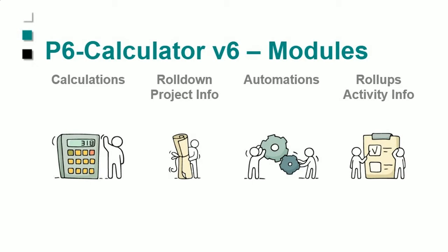So that's one example. Another example that we use for our contracting clients very, very often would be to take the cost price, add on your overhead, add on your profit, add on some additional percent factors if you wish, and then come up with the sell price.